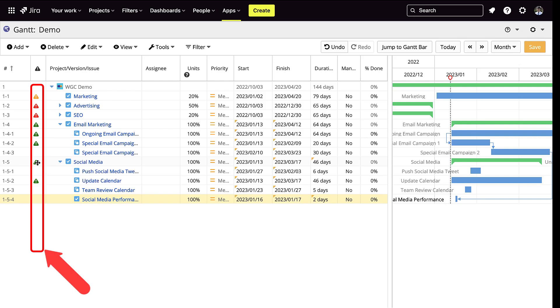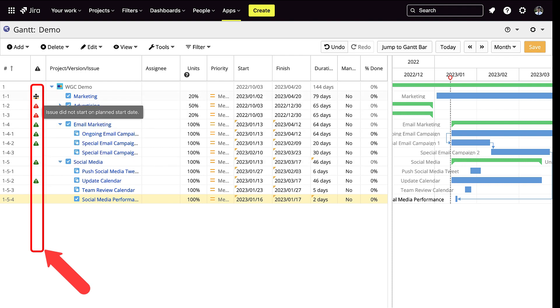For the alert feature: if the warning is green, it is three days prior to the start date. If the warning is yellow, it has not started yet. If the warning is red, the task is not completed yet.